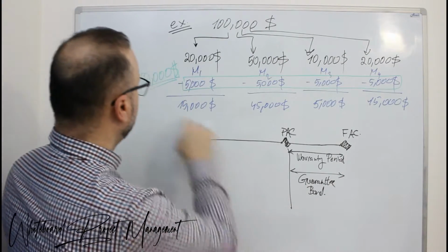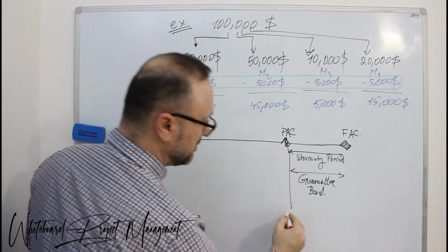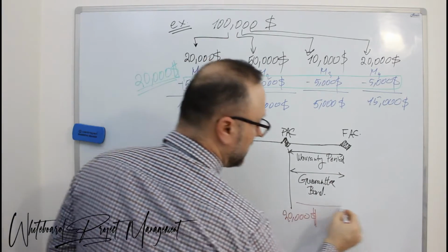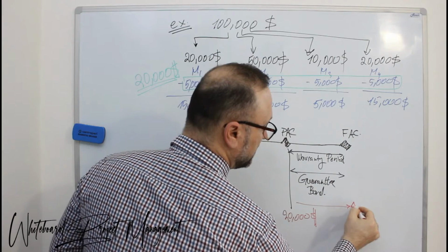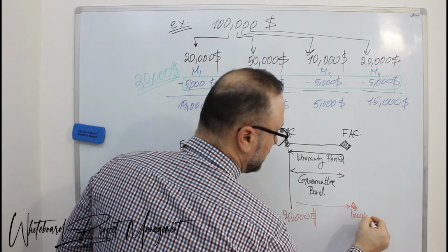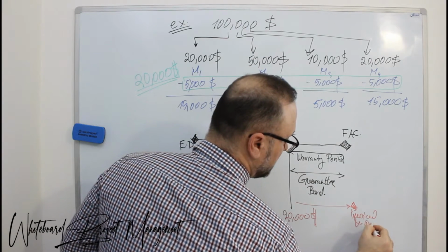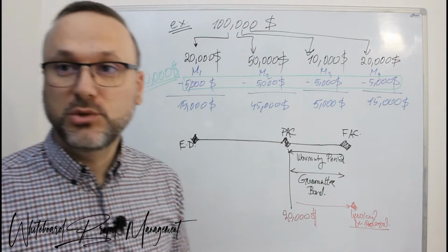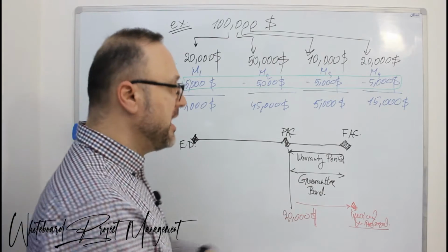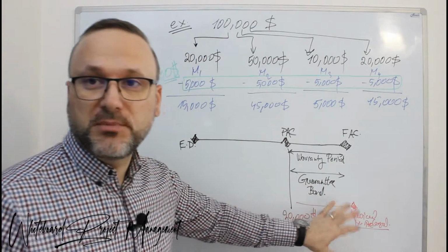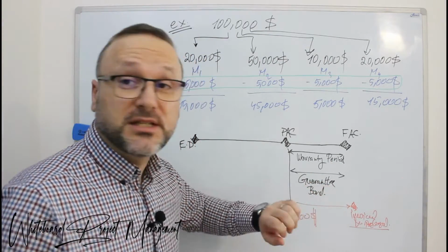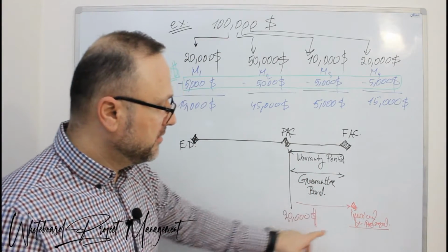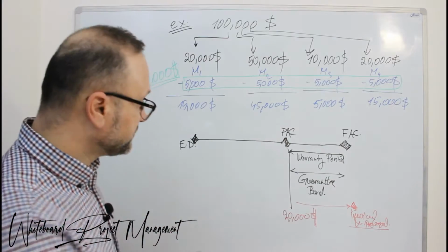So here the amount of 20,000 should be ready, and here to be invoiced and released in case there are no problems. If there is a problem, the contractor is committed to repair it. If the contractor doesn't repair it, the client could claim it and back invoice it from this amount.